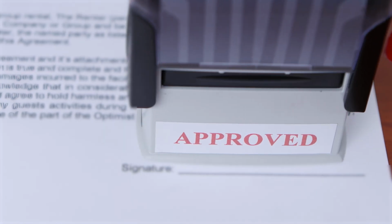From our experience too, the state approval is a completely different animal than local approval because they don't worry that much. They just check general structure, and the turnaround time for approval is not that long like for local approval. And then once you have state approval, it's much easier to get local approval. So in total you have like 2 approvals, but faster than regular local approval.